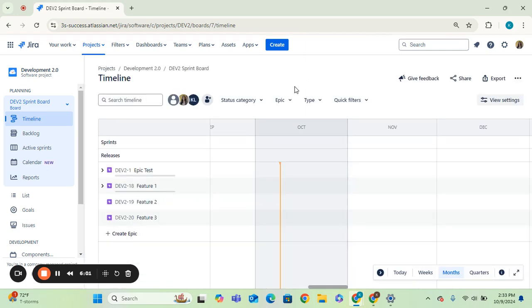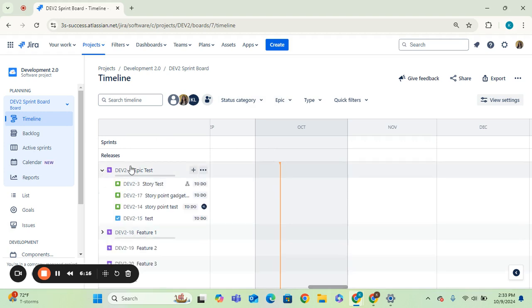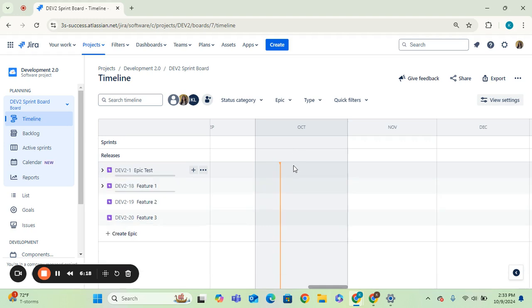And this is where you can build out a timeline or a plan or a roadmap for your particular project. In this view, you can have your timeline drop down by epic. You can have something set by sprints. So here you can see with the epic, you have this drop down. The way that you set and use the timeline is you click on when you want a task to start. So when I want this epic to start, and then you can click, hold, and drag to when you want that task to end. You can do this and you can set this.